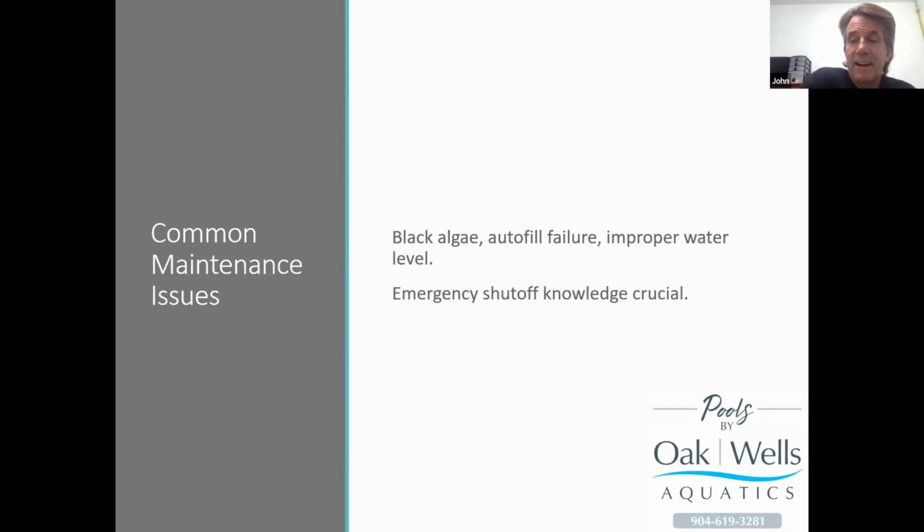And once I got that, I had to submit to the Daytona Beach Building Department. That whole process, keep in mind that this was right behind a storm that just inundated that little section of the east coast of Florida. So the building departments were overwhelmed. I worked on those permits for 9 months. Wow. That's the worst case we've ever had.